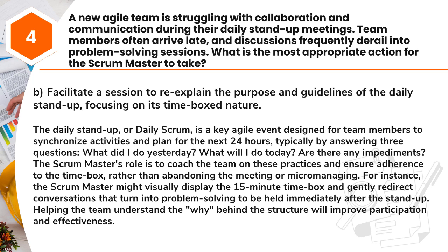For instance, the Scrum Master might visually display the 15-minute time box and gently redirect conversations that turn into problem-solving to be held immediately after the stand-up. Helping the team understand the why behind the structure will improve participation and effectiveness.